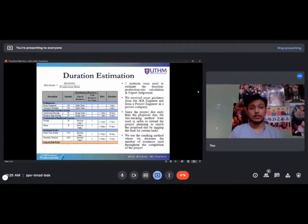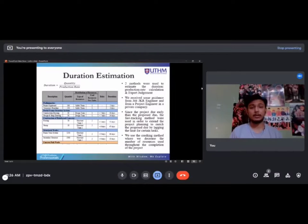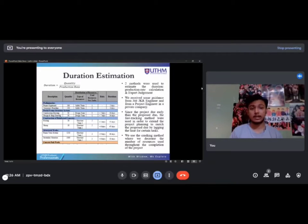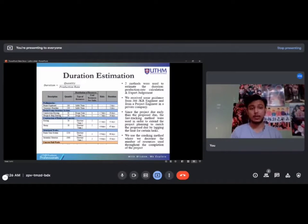Two methods were used to estimate the duration: the production rate calculation and expert judgment. We received guidance from a JKR engineer and from a project engineer in a private company. Since the project finished earlier than the planned due date, the fast tracking method was used to extend the project planning to match the due date by lagging the time for certain tasks. We also used the crashing method where we decreased the number of resources used throughout the completion of the project.